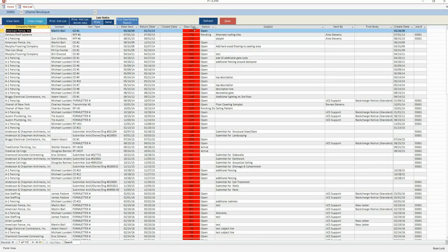The hot list represents all past due items created in the JCPM system, including user-defined action items. The hot list can be set to display items coming due in a specific number of days. Therefore, you can take care of the item before it is overdue.